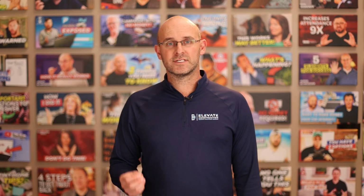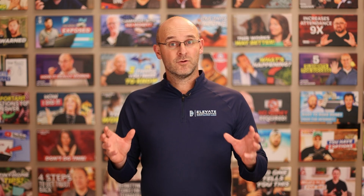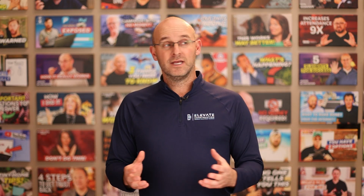So here are some key characteristics and principles of integrated project delivery. Number one, early collaboration. From the beginning of the project, even right after the interview, after contractor selection, the integrated project delivery method really allows all of the stakeholders, the owner, the architect, the engineers, the contractor, and even key trade partners with the end users in most cases to start to co-locate, work together in the right meeting system, in the right cluster groups, and really head towards great milestones that will complete different phases of the design. So we have early collaboration. That means that we're integrated.